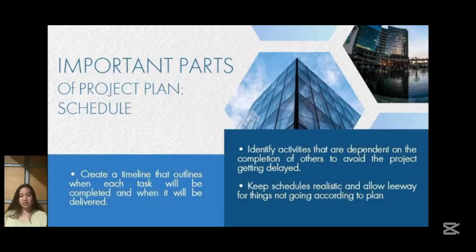So next is the schedule. Create a timeline that outlines when each task will be completed and when it will be delivered. Identify activities that are dependent on the completion of others to avoid the project getting delayed. Keep schedules realistic and allow leeway for things not going according to plan.